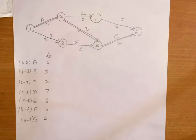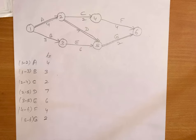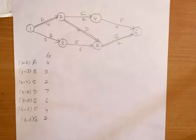Dear students, yesterday we discussed example 13. We learnt how to calculate expected time for each activity and how to find out the critical path, which was 1, 2, 5, 6 — the longest path.